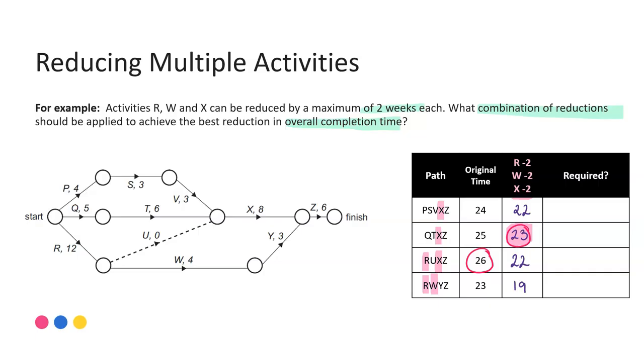So then my next step is to work out what reductions do I actually need to do. The process I tend to look at is firstly I concentrate on the new critical path. What did I do to achieve that time of 23? Well by highlighting in my table that gives me a hint or that helps me track. So I actually reduced X by two weeks. My next step is then to look at the original critical path and look at what reductions might I need to do in order to achieve this new critical time of 23 weeks. So originally it was 26. I need to bring it down in line with the new critical path. So that means I need to save three weeks.